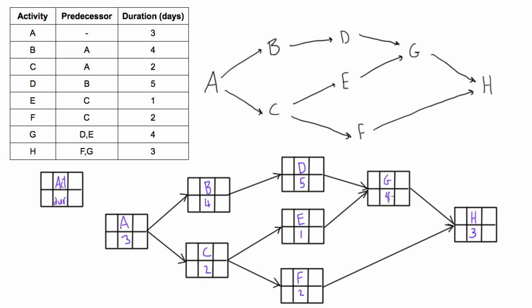Predecessors as our rough draft here. And you can check to see if any of these are correct. For example, let's inspect node G here. The predecessors for G are D and E. So D and E. And then the only thing that's coming off of G, the only thing that depends on G is H. So we're going to check out H here. Yeah, H definitely does depend on G and F for that matter. But yeah, we're good. It looks like we've done this correctly.